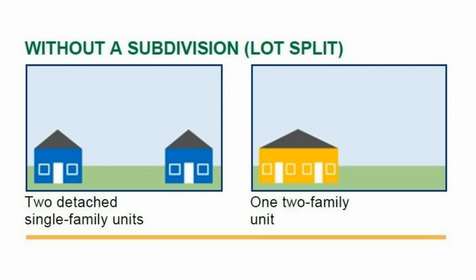Background: Governor Newsom signed Senate Bill 9 on September 16, 2021, establishing a 2-pronged approach to require increased housing density in single-family residential zones. First, if certain conditions are met, Senate Bill 9 requires ministerial approval of up to 2 units on a lot in single-family residential zones. The units may be in one structure or 2 separate structures. Second, the statute requires ministerial approval of lot splits in single-family residential districts, subject to similar conditions.